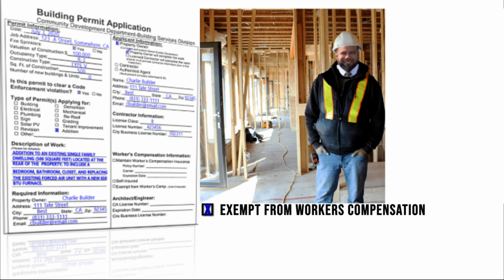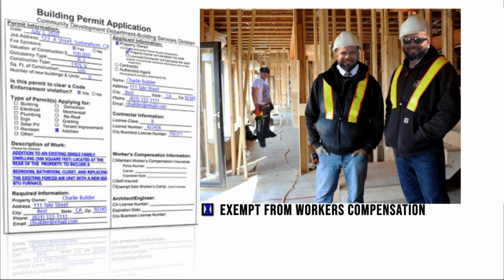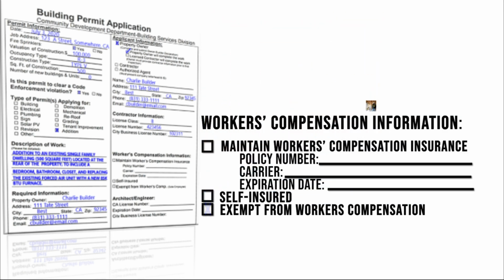A worst case scenario would be if, say, the contractor certifies that they have no employees, but ends up bringing in help to work on the project, and the help gets injured. Now, this scenario can put the property owner in a legal bind if the help decides to pursue damages caused at the property against the property owner as well as the contractor. I urge you to verify workers' compensation requirements with your state contractor's license board prior to hiring your contractor.